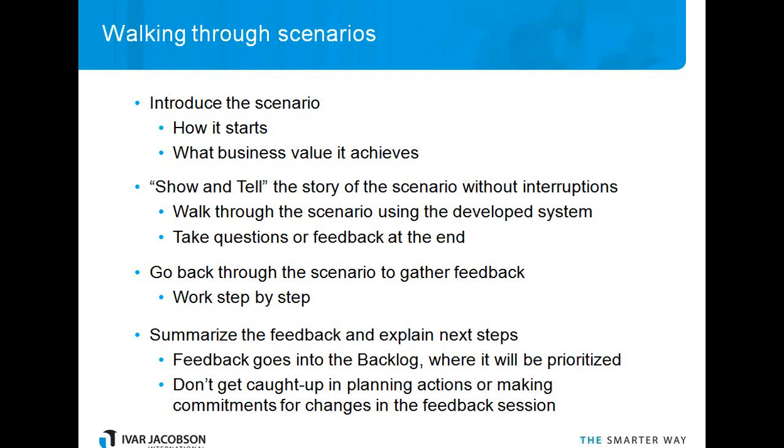And typically the feedback that you're getting now, you don't want to automatically put into the next iteration unless it's really critical. So you talk about whether these things are more important to deal with than things we already have planned for the next iteration. And if so, let's talk about the relative priority. But don't feel like you need to respond to everything immediately. It's perfectly fine to have it go in the backlog, and most people are fine with that. They just want to make sure that their feedback is taken into account at some point. Next slide, please.